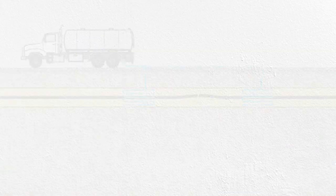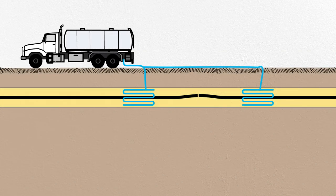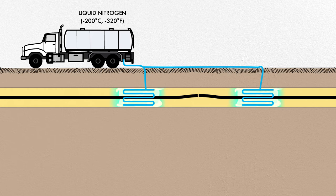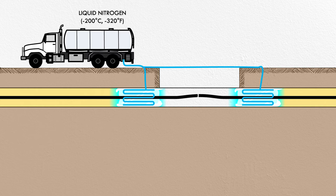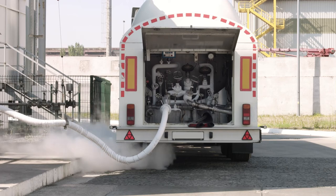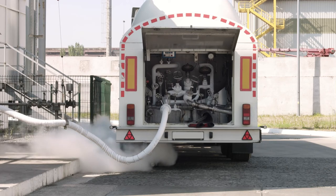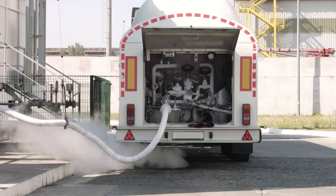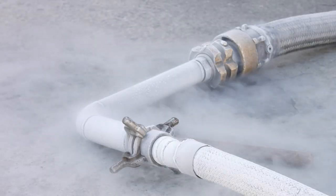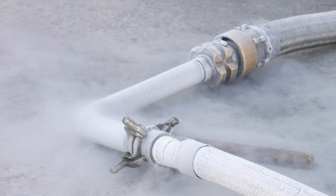The clever solution they used was to freeze the oil using liquid nitrogen, which is usually around minus 200C or minus 320F, creating solid plugs on either end of the section to be repaired. This allowed the rest of the pipe to remain under pressure. Losing these plugs would be a catastrophe, creating an eruption of high-pressure oil and spilling huge quantities of it into the environment. So the repair crew had liquid nitrogen companies on call across California as contingency to ensure that the oil could be kept frozen for the duration of the fix.